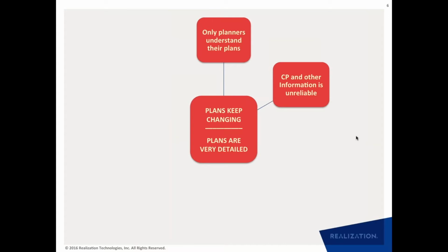But if the critical path keeps oscillating, something is not on the critical path today, something else is on the critical path tomorrow, and then the thing that was on the critical path today comes back onto it, that fluctuation, that constant change is what is bad. It's absolutely acceptable in a project that the critical path can change over the duration of the project. But if it keeps oscillating back and forth, that is what makes it unreliable.